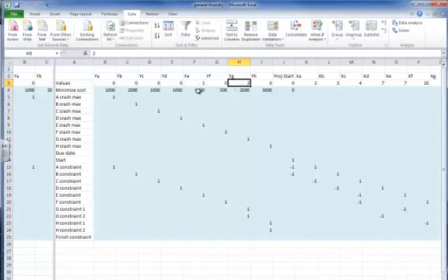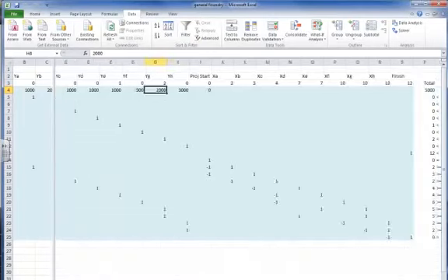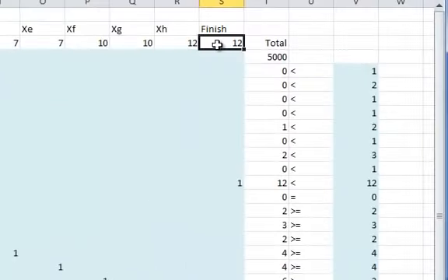Task E cost us $1,000, and then task G cost us $2,000 for each of those weeks, which is what gives us $5,000. And I also can see here that indeed I have finished within 12 weeks for a total of $5,000.